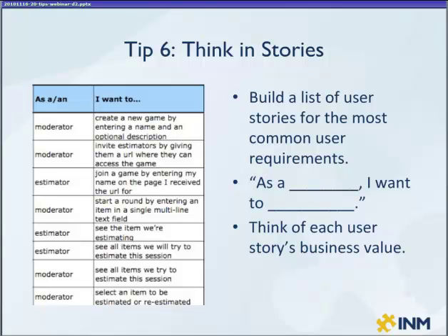So once you've written your stories, I suggest you assign each user story a business value. How important is the story? Would it matter if it wasn't implemented? Does it concern one of your major stakeholders or user personas? What priority should it be given in the project? And you can actually put a number next to each of the story from 1 to 10, 10 being those with the highest business value, without which it wouldn't even be worth launching your website.